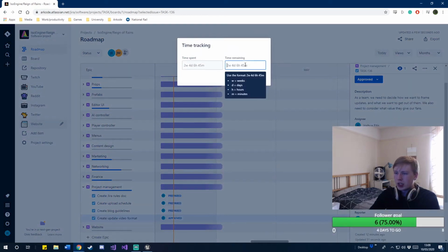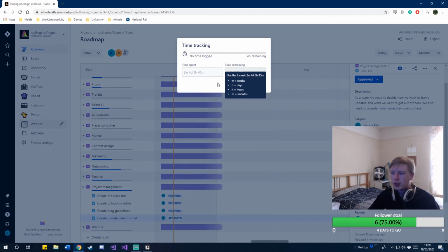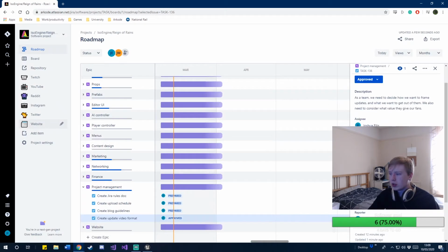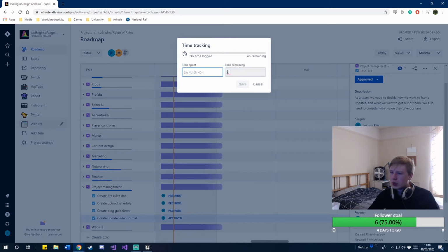This is a bit more of an undertaking because we really need to decide how, why, and when we want to do update videos. So I'm going to say this is a 4-hour job. It's a lot more involved than the other ones, and it involves me and Matthew sitting down together and really hammering it out. Actually thinking about it, I don't know if that counts as double hours because 2 people are putting separate hours in, so I'm going to up that to 8.